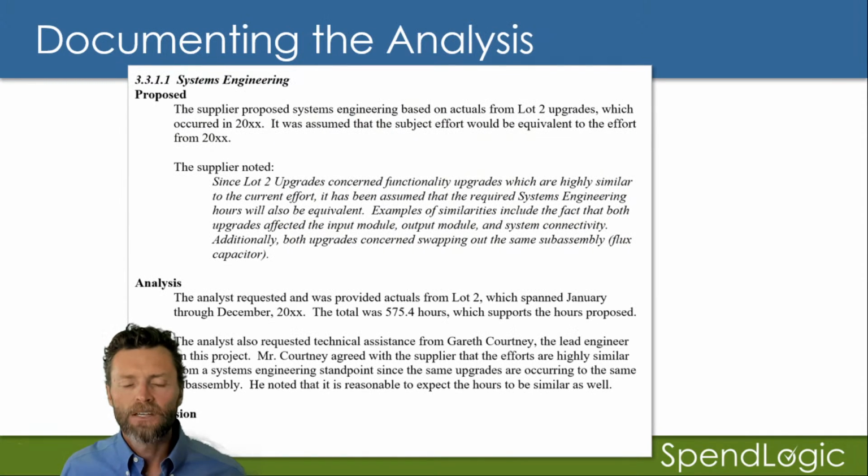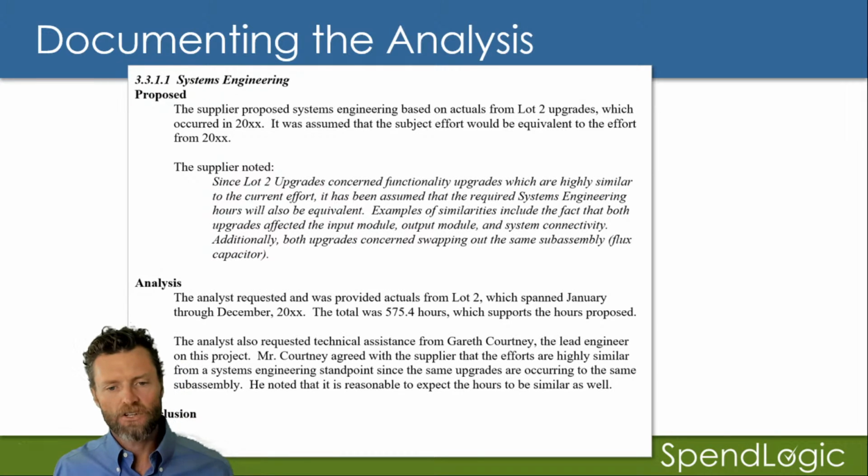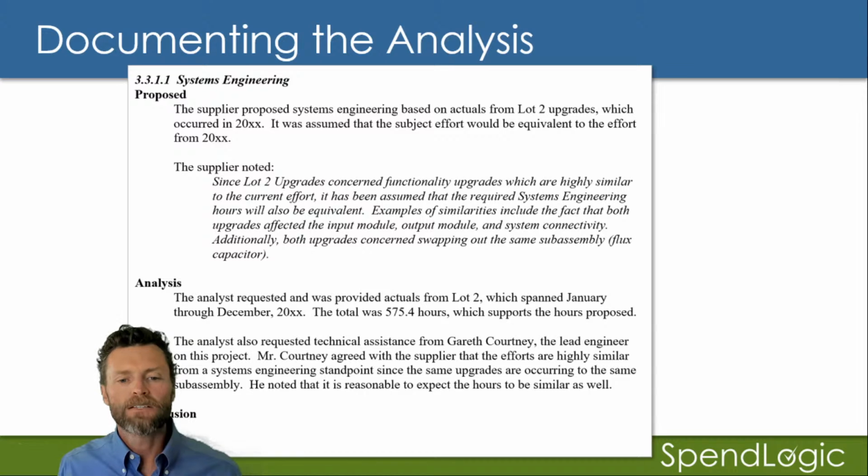So what I've done is, in my analysis position, I've already reached out to my technical evaluator. I said that I've requested and received the actuals from lot 2. They proposed 575.4 hours, which supports the hours proposed. I'm explaining my work. I talked about what I did.